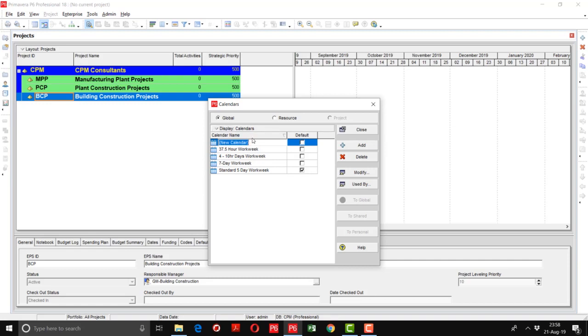Suppose we are here to make two calendars. One is head office calendar, because our project will be an EPC project. Engineering and procurement will be handled in head office, and we will prepare a calendar for those activities separately, and our construction will be managed by another calendar. We will call that calendar a site calendar. So you can create different types of calendars for one project.